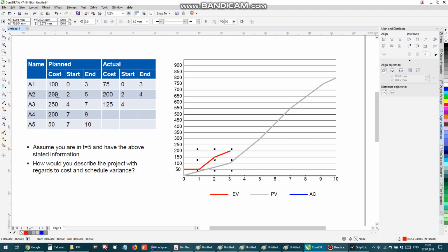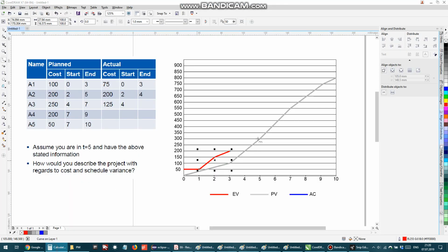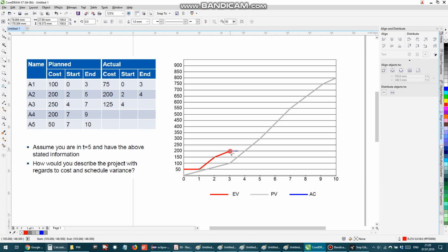So 100 from here and 125 from here. And that makes 200 plus 100 plus 125. That's 425 by day 4.